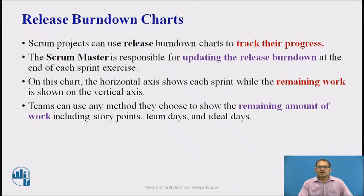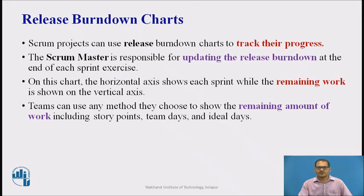Let us see the Release Burndown Charts. Scrum projects can use Release Burndown Charts to track their progress. The Scrum Master is responsible for updating the Release Burndown Charts at the end of each sprint. On this chart, the horizontal axis shows each sprint while the remaining work is shown on the vertical axis. The teams can use any of the methods they choose to show the remaining amount of work.